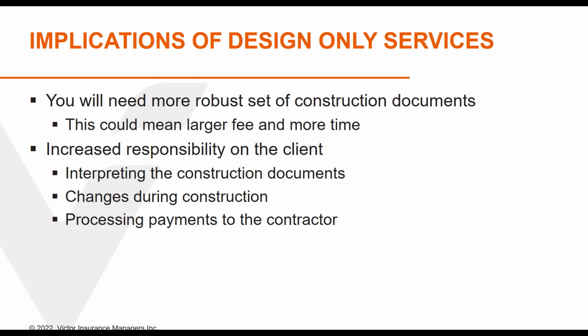They will have to interpret the construction documents. They will have to process all of the changes during construction, and processing payments to the contractor becomes much more involved by the owner, because they have to make sure that they are in compliance with the covenants that they have with the lender and certifying that what is being paid for reflects what has actually been put in place.